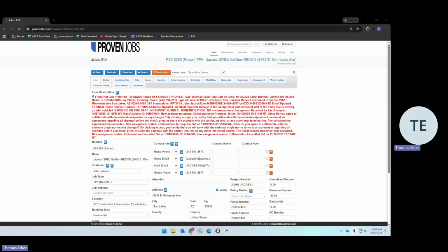Weekly, you need to touch every job once minimum, no exceptions. Every job in production, you are doing something with weekly, inspecting it, providing updates at least once for every job that is on your list weekly.